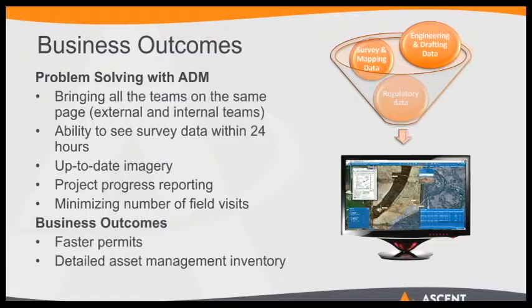If you have all that information in one spot, you can do it without having to always go to the field, come back, wait for the data to process, and then do it maybe again. Okay. And so, one of the bullets on here is minimizing the number of field visits. Obviously, when plans change, and they always do, right? As a survey company, we're familiar with getting sent back out into the field, which nobody wants, because that can increase safety incidents occurring, unfortunately, every time people are back out in the field. And obviously, it delays the project. And ultimately, it's going to have a cost implication as a result.